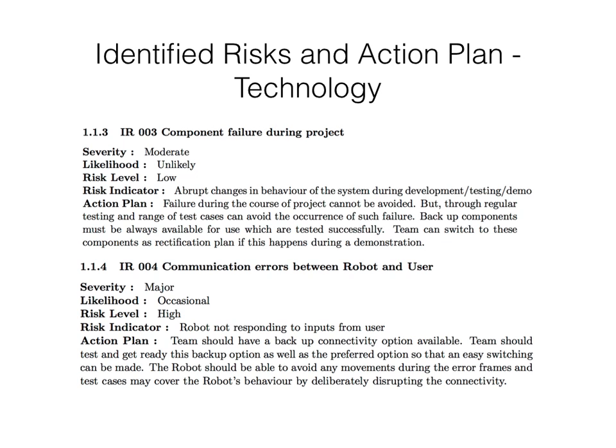Next one is a component failure during any phase of the project. That can be development, testing, or demonstration. Development and testing is less severe, because we can still replace or repair the component. But if it happens during the demo, it is not a risk that we can avoid at all stages.